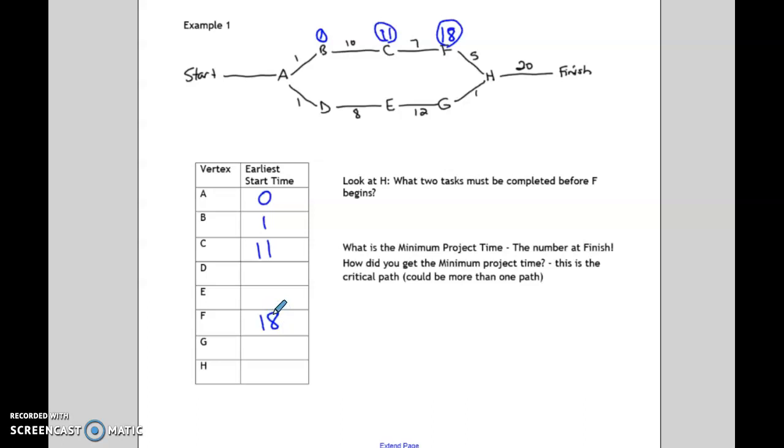Okay, next we're going to add the sauce and stir that in, warm that up. That'll take 5 minutes. So we want to add 18 and 5 to get to 23. So for H.